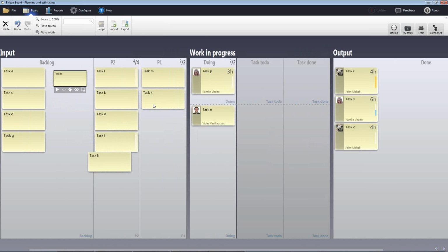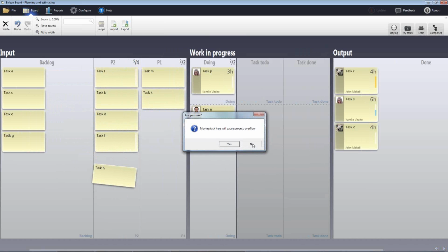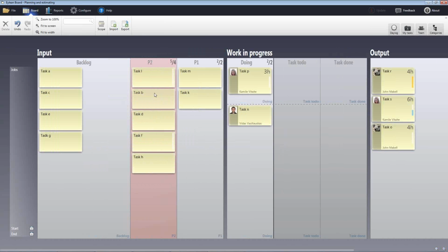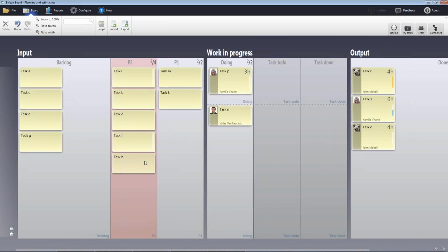With these electronic boards, as you've seen here, I cannot overflow my process. It's configurable. Now I have configured it to allow some kind of override. So whenever someone does reach the limit, it also notifies that there are slightly more tasks than there should be. So the team should make a decision whether to put the items back or move them forward faster.